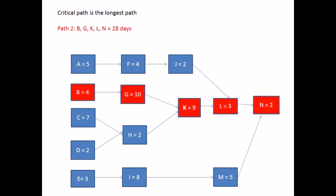However, it is not always possible to simply add up the duration of the activities to determine the critical path. The most common method used is called the critical path method, CPM. This involves calculating the amount of contingency time or float there is between activities. To revise how to calculate float using the critical path method, view the CPM podcast.